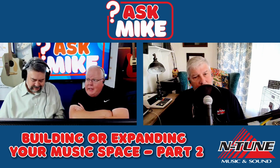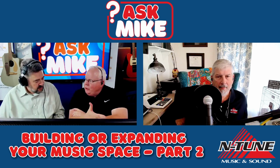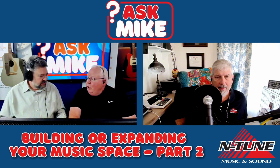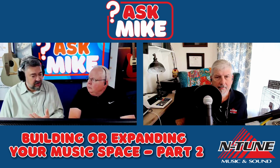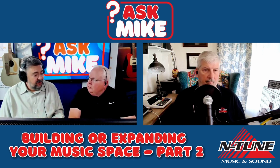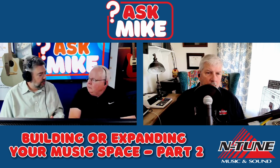And I've got a question for you, Jay. Is there usually one point person like you, or do the contractors listen to the band director, choir director, orchestra director, fine arts? Or is every project different? I'd say it depends on the local scope. In Victoria, Abilene, and Allen, we had somebody designated from the school district as the point person who would attend all the meetings. So it always comes to you. Usually it's your operations superintendent, and then they would invite the people to the portions of the meeting that were directly involved. If it's an athletic project, usually the athletic director would be there for their portion.